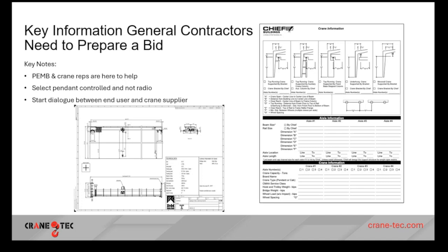No, I don't think you're wrong in that assessment. I think that's a clarification that the general contractor needs to make with the owner. Or if they have the crane supplier involved, that's a clarification that we will make. That would be one of the first questions I would ask a customer: you're looking to buy in this one bay, you have a 5-ton crane and a 10-ton crane. What do you want the total capacity of the runway to be? Are you going to bring those 2 cranes together to pick up 15 tons and clarify that?